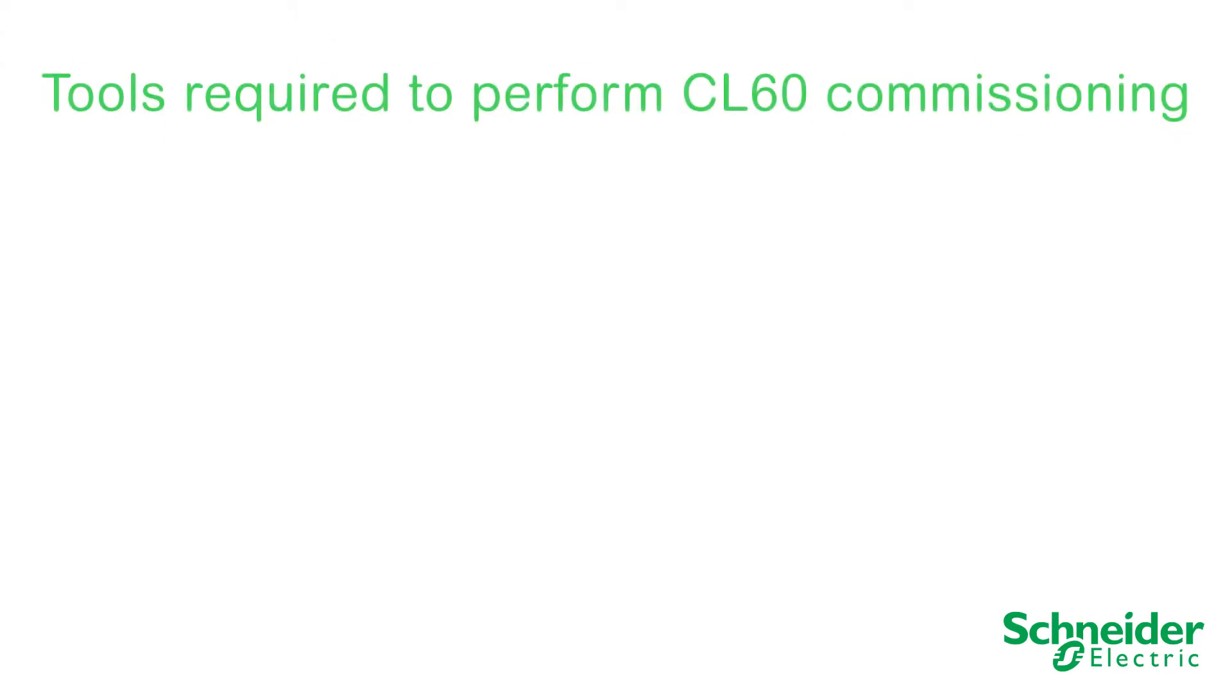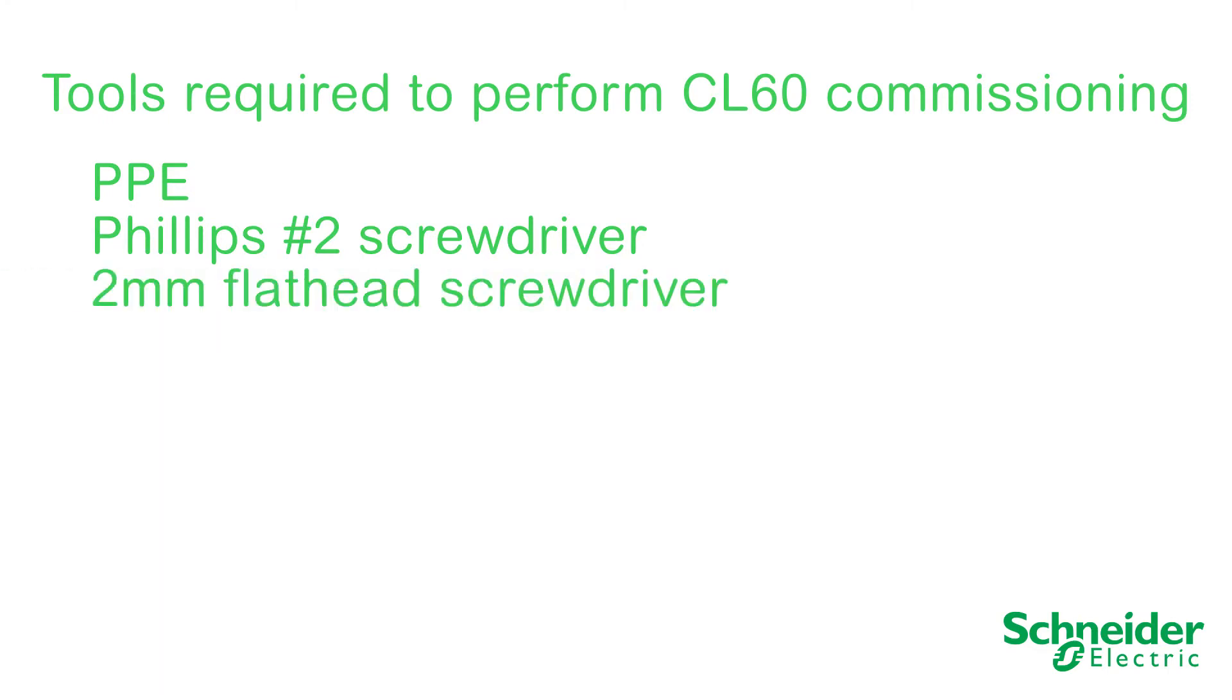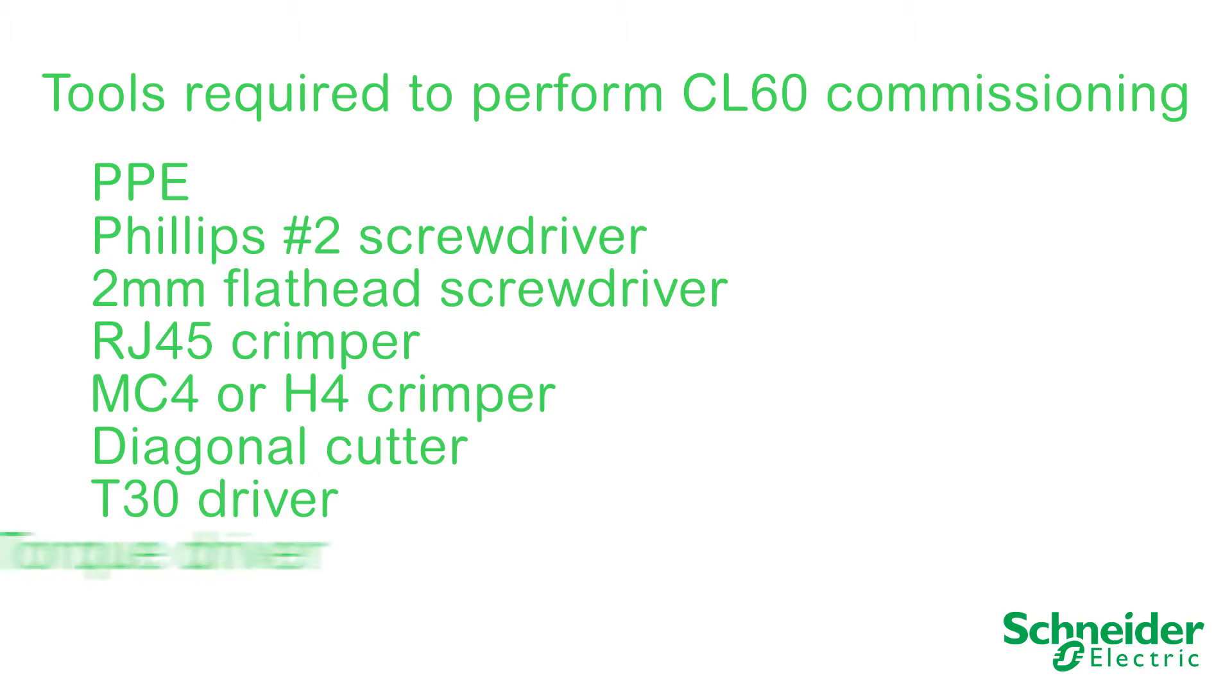The following tools will be required to perform CL60 commissioning: PPE, a Phillips number 2 screwdriver, 2mm flathead screwdriver, RJ45 crimper, MC4 or H4 crimper, diagonal cutter, a T30 driver, and a torque driver.